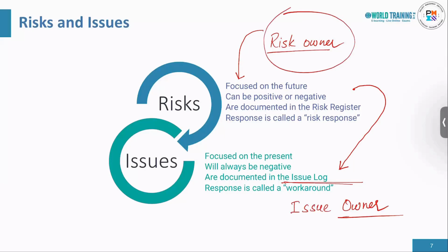Another important difference between issues and risks is that issues typically do not need a mitigation plan, since most are already at hand and need to be acted upon immediately. But if an issue is not impacting any of the project attributes for now, but could in the future, a mitigation plan is a possibility.